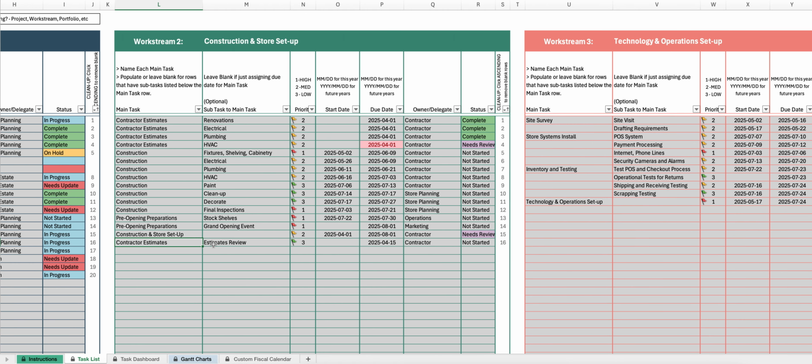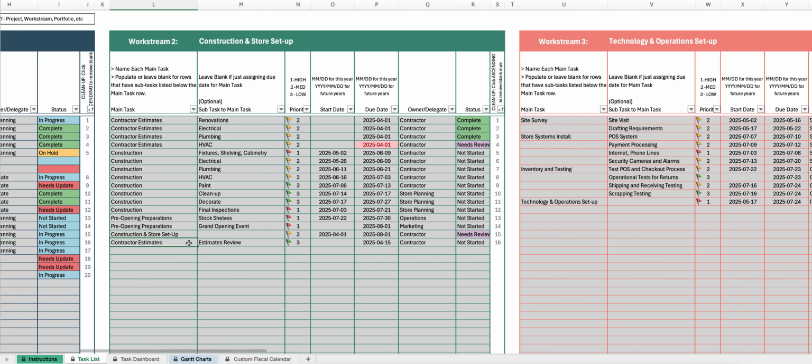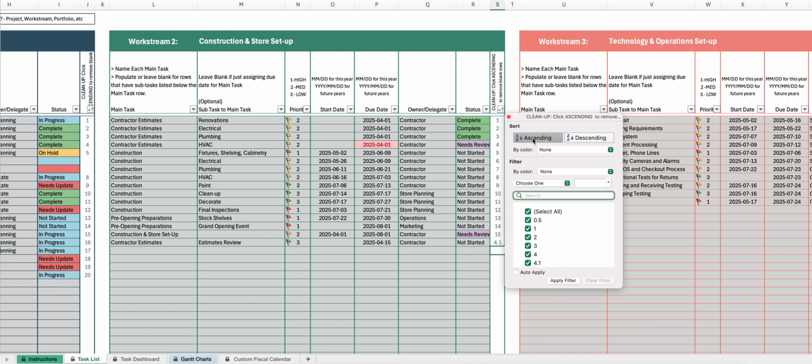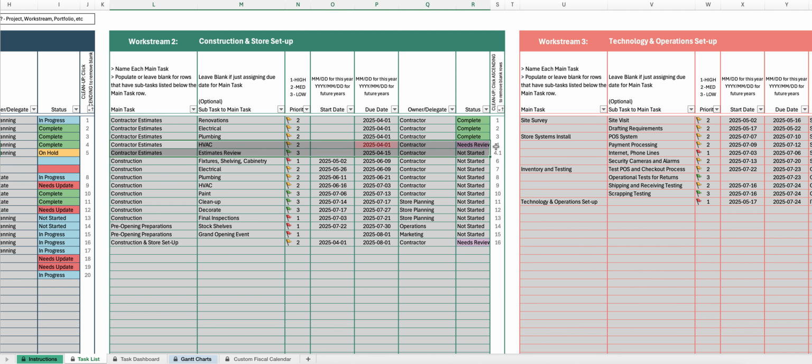It will still be counted, but if you really want it moved up, simply override the task number to be in between the two tasks where you want it to show up. So in this case, I want it to be just after task 4, so I'll jot in 4.1. Then do the cleanup sort, and there it is. To now get this task to follow the default numbering system, just drag from above or copy and paste from another cell in the column, and it will now follow the normal numbering system.